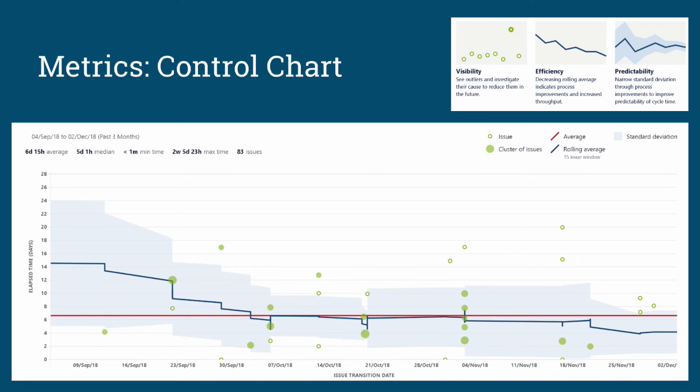All of our bigger clusters of user stories, which are the green dots you see here, really clustered in, and it became very easy for us to just go from one release into the next one. You can see there's a dip down, then an increase in our overall predictability once we reached break, which we did expect, but then it continued to improve after break as we continued with our process. The outliers in story points are just research tasks that we continued throughout the duration of the semester that weighed in on the rest of our stories. So really everything here was optimal for us.